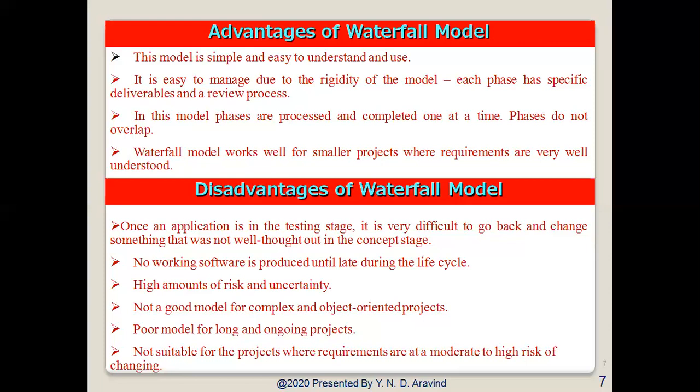Then in which situations can we use the waterfall model? It is for projects for development of mainframe-based systems or transaction-oriented systems. We can use this model, and these projects are large, expensive and complicated. The project must have clear objectives and solutions. When we have clear objectives and a clear solution, only then should we go for this model. We need to go for this model only if there is no pressure, or no hurry in implementing it. When we have more time, we go for this model.